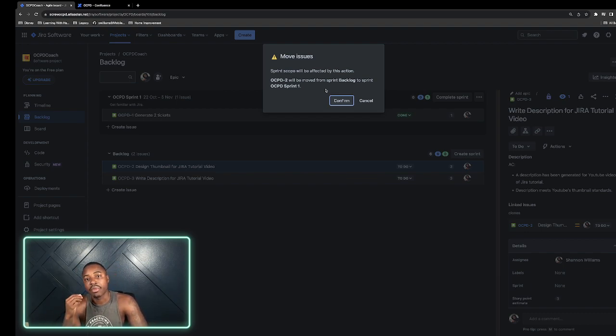When we were talking about this, the points, the amount of story points that it would take to complete a ticket, these are actually useful because as you continue to do sprints, you'll actually get averages. You'll get metrics on how many points you're actually able to complete each sprint, which is really cool if you're the type of person where you like to say, how much work do I typically get done?